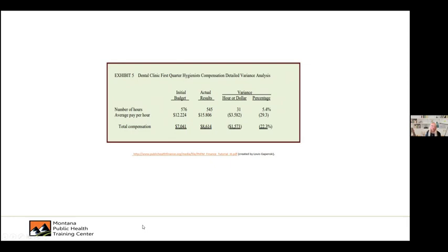So that's just a simple thing. And hopefully you will be able to take your own budgets and do the same thing. You can do a variance analysis from year to year, right? You can take your actual results from last year versus this year. You can take your initial budget versus all the pieces overall for the year, where were you at? Or you can do this on a monthly basis, right? If you're keeping it up for yourself personally, or if you're having to give a report, let's say at those quarters, you can look month to month and see where the variance is. There's a lot of different ways that you can actually do this.